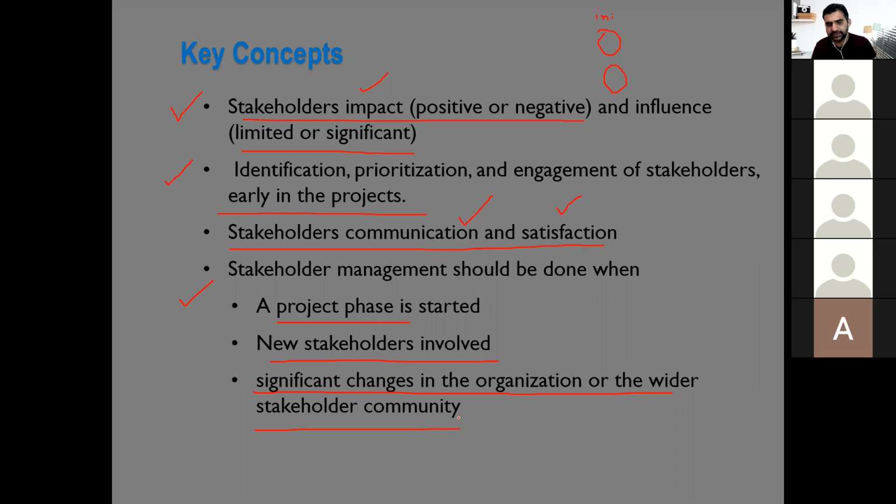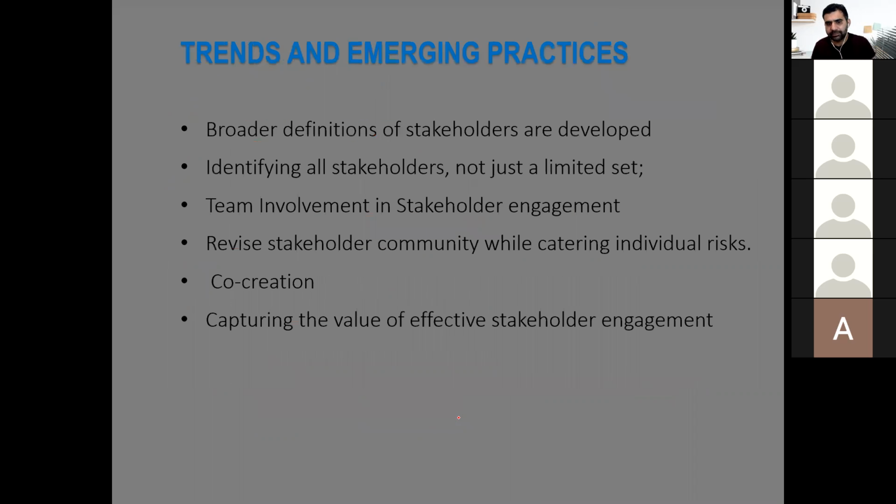So the stakeholder management processes, especially the identification of the stakeholders, are done when the project starts or a new phase of the project starts, or if new stakeholders are identified or involved, or there is a significant change within the organization or with the wider stakeholder community. Trends and emerging practices.